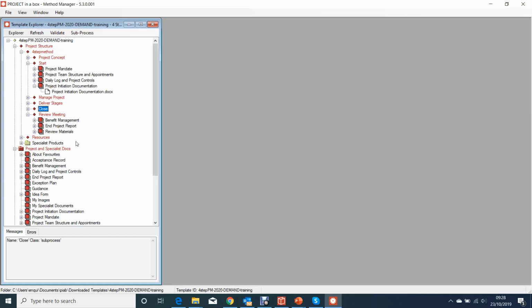It writes to the database what the process names are for this project, which documents should be shown in each of those processes, and it writes to the database, if you like, the documents and templates that it launches into that project so that it can provide that material. That's never used ever again in the life of that project. You only create the project once. It only establishes this structure once. So the process names that you give it at the start of the project, it will always have. There is no way of changing those through the life of the project.